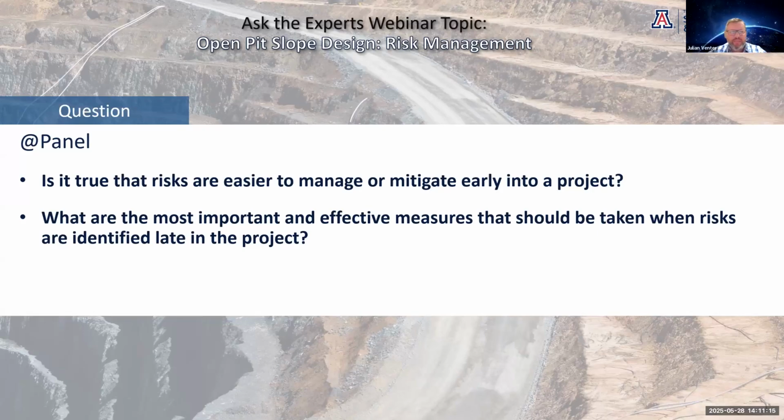Sure. Thanks, Gillian. So in general, it is true. But if you think about a typical project going from concept to pre-feasibility to feasibility and then implementation, the more time you have to solve a problem, the easier it becomes. So earlier on, you have more time than later on. But you also have more options to solve the problem earlier on than later on. But at the same time, in the beginning, you don't have a lot of data.